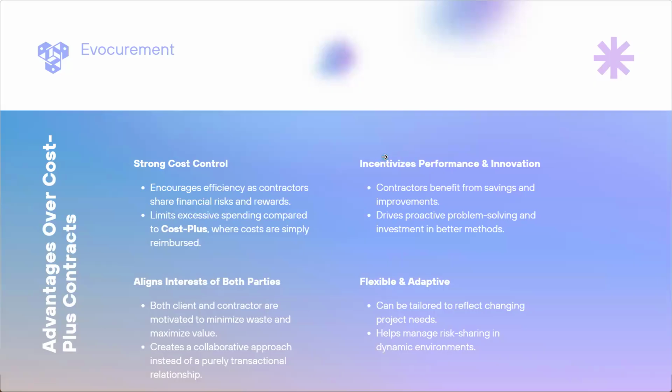With pain share gain share, it is more flexible and could be applicable in more innovative projects. It shares the risk between parties, and everyone will benefit. They know that the risk will be shared, and they can also take more ventures. They can make bolder decisions regarding the project and may achieve a breakthrough in that method.